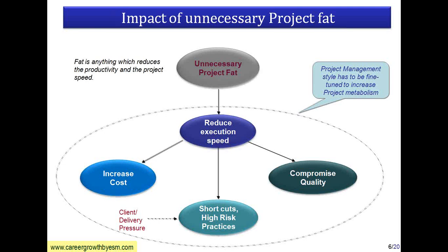What happens because of that? It can compromise the quality of the deliverable. It can even increase the cost. If you give a lower quality deliverable and the customer tries to accept it, and it has to be reworked, then overall cost is going to increase because you will have an effort overrun. So the whole thing has to be looked at in such a way that the overall speed reduction is an element of balancing both the timeline and the quality of deliverables. It is not one of the tasks. Basically, you have to balance the cost, timeline, and quality. All these 3 factors have to be balanced together.